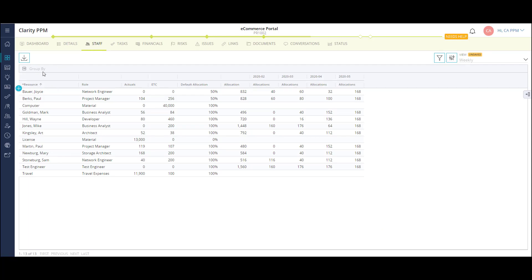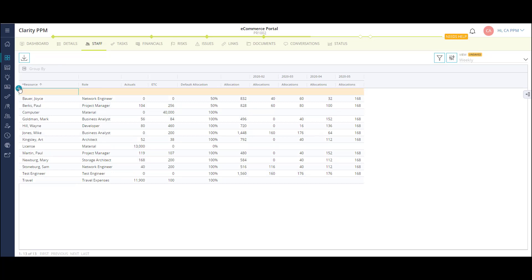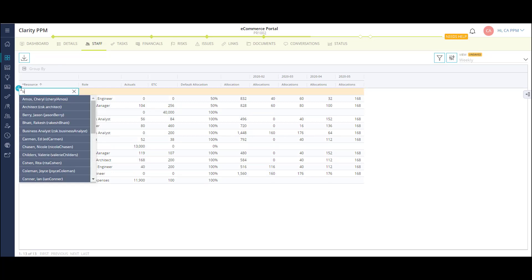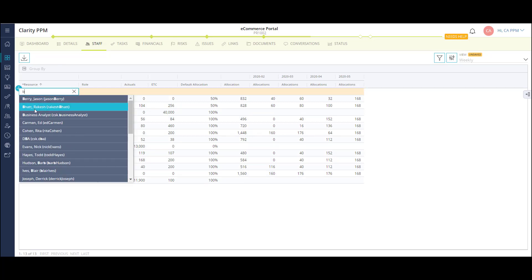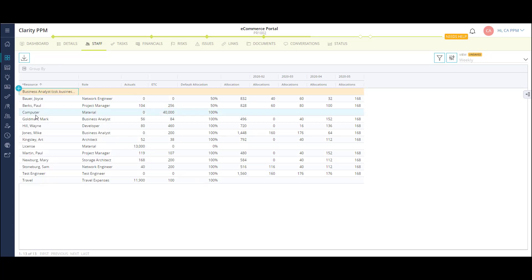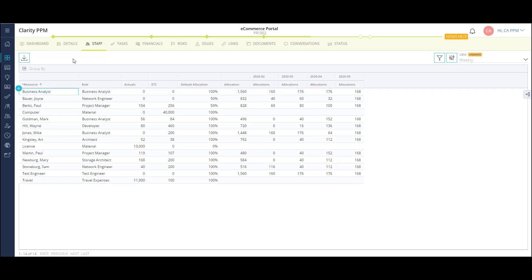My project team consists of both labor and non-labor resources, as well as roles that have not yet been filled. As a project manager, I can add a role to my project and populate the expected allocations. A little later, we'll look at how resource managers can fill these requests.